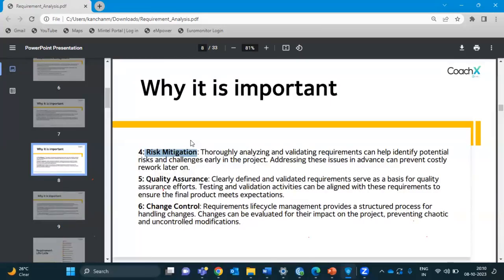Or there could be some expertise, very high-end technology, a resource that is needed which we do not have currently. That's a risk that, after maybe 15 days, we do not have someone who would be taking care of this. So might as well start looking now. Or some risk could be that the data is exceeding the limit. I'm not having enough storage. Might as well start getting more storage from the cloud. So that is a risk.